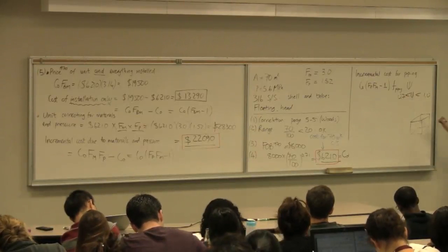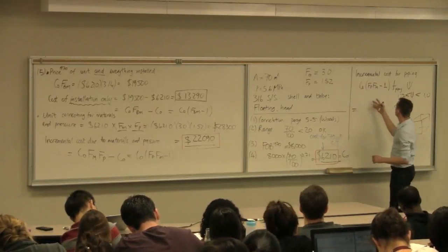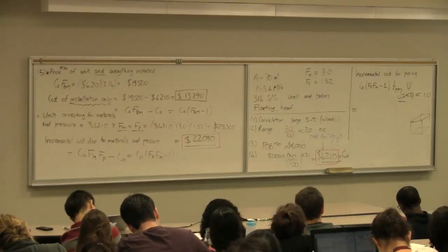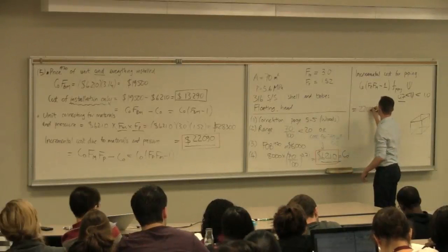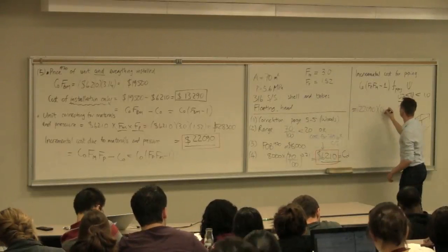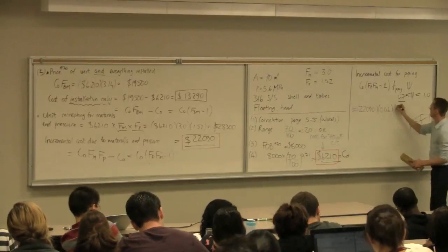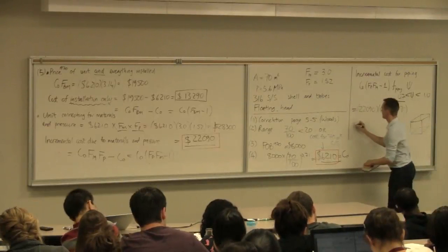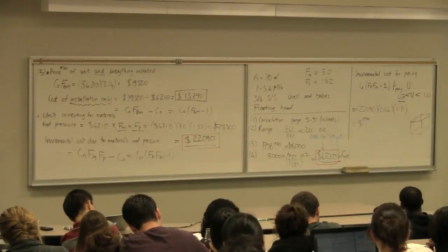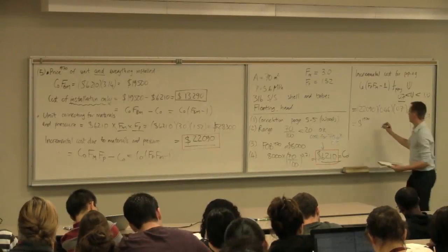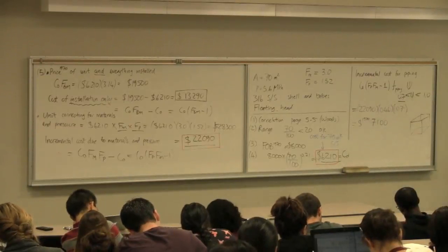So I'm going to use 0.7 here in this particular example and finish up. So if we take this base cost over here, which is then $22,090, multiplied by 0.46, which is the fraction in the bare module cost due to piping alone, multiplied by 0.7, it's going to cost me an additional $7,100 to interchange this piping in my unit, in my bare module.